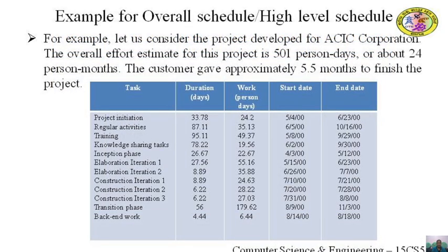The overall project planning has produced this high-level schedule. This high-level schedule is not suitable for assigning resources and detailed planning. For detailed scheduling, these tasks are divided into schedulable activities. This detailed schedule also serves as a checklist of tasks for the project. This task of dividing top-level activities is not done fully at the start, but rather takes place many times during the project.